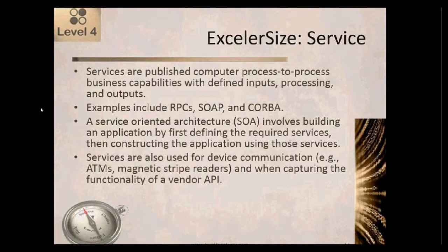Services are also used for device communication, for example, ATMs or magnetic stripe readers, and when capturing the functionality of a vendor application program interface. If a vendor provides a library of functions, each one of those functions may be considered a service. So they're basically computer capabilities that are then exposed to the world, or at least to other applications, and made available to do something as a service to that other application.